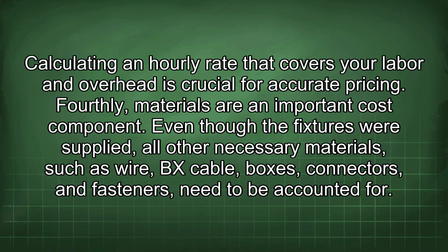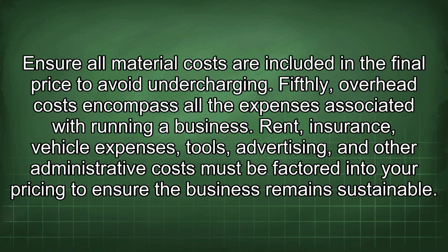Fourthly, materials are an important cost component. Even though the fixtures were supplied, all other necessary materials such as wire, BX cable, boxes, connectors, and fasteners need to be accounted for. Ensure all material costs are included in a final price to avoid undercharging.